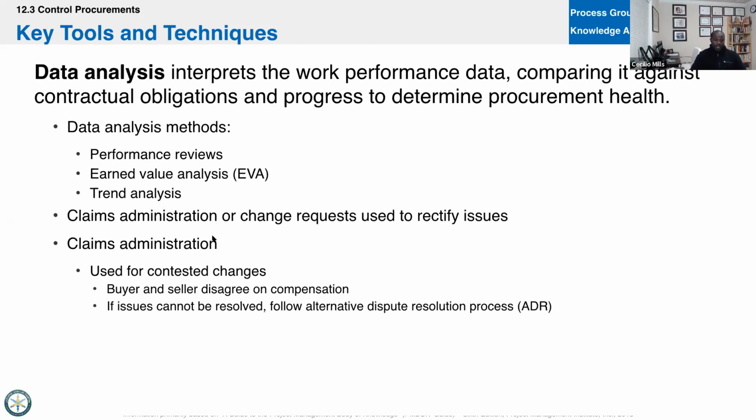So that is the claims administration procedure. We first look to negotiate, then we go to mediation, then arbitration, and then litigation. That's how you escalate through the claims administration procedure. PMI is going to ask you questions about this, and they're going to describe the fact that you have some dispute and you're arguing, aka negotiating, or some third parties come in, or you've gone in front of an arbitration panel, which is quicker to get on the docket.